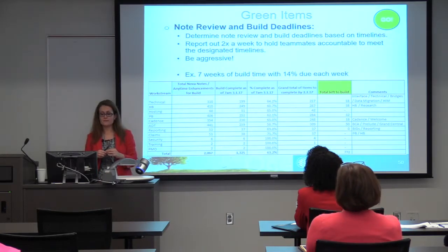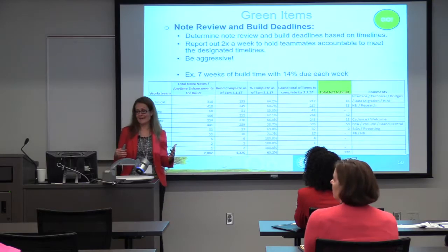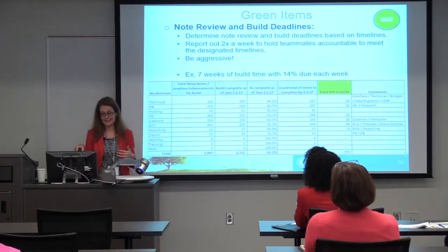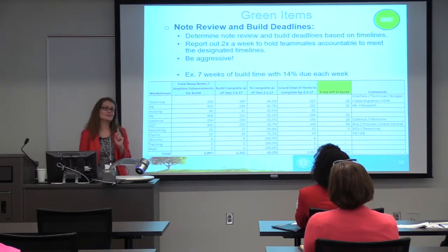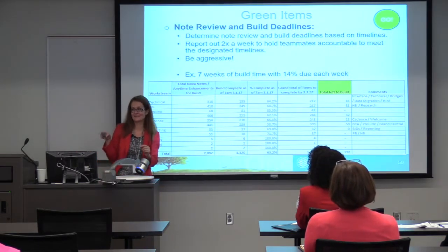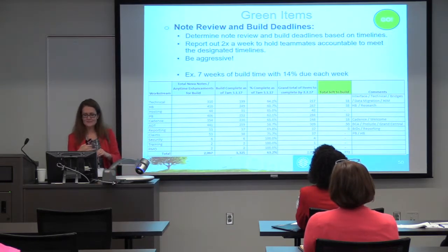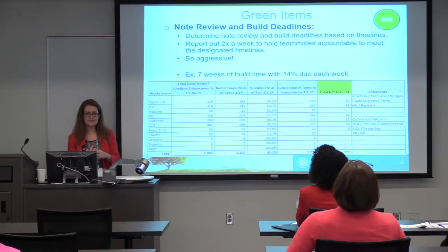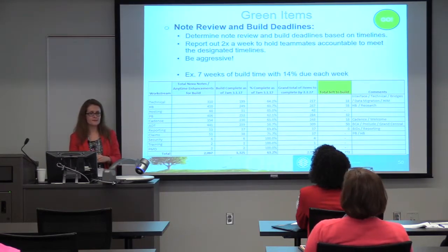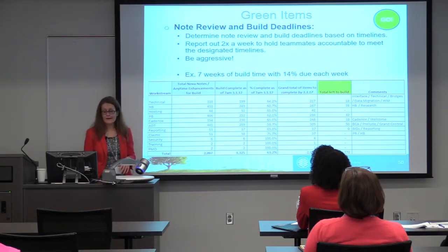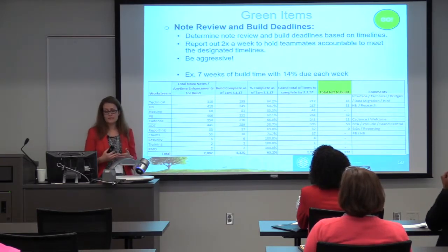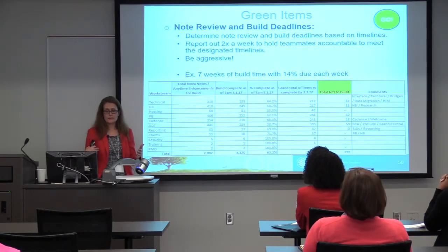So Christina and I were not friends of the team during this period because we were basically showing, hey, you're not done, your deadline is Friday, but we're not going to report out again until Tuesday, so you have the weekend to work if you want to get your stuff done. We were very aggressive on these timelines, and quite honestly, we got a lot of kudos from Epic. They were very impressed with the deadlines that we set, how aggressive we were, and the results that we had.